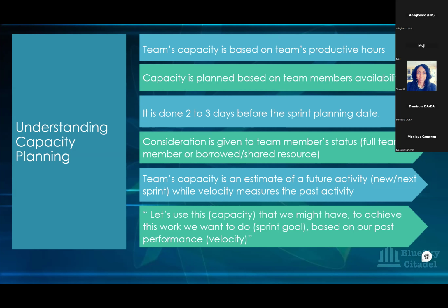So if those two people have told the baker or the chef that they're not going to come in because they're taking holiday off, there are two things they can do. Number one is to prepare the stores that are getting the output to say the output you will get will need to be reduced, which is negotiating with the PO to say we need to reduce what goes in because we have less capacity.